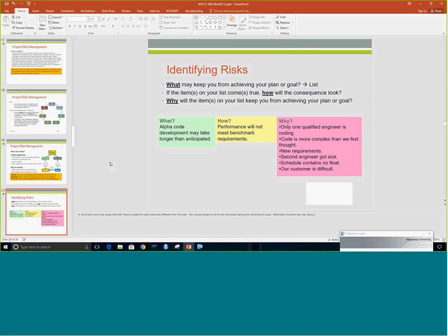How do we identify risks? Well, typically, go around your technical team. Always start with the technical team because it's the people who are where the rubber meets the road, who are at the lowest possible technical level, or closest to the technical implementation in your project, that will tell you what the risks are. Sometimes upper management will want to weigh in with some business risks or some stakeholder risks, and those are important too. But never forget to ask the people who actually do the real work. And I learned that the hard way, so here's my wisdom that I'm passing on to you.